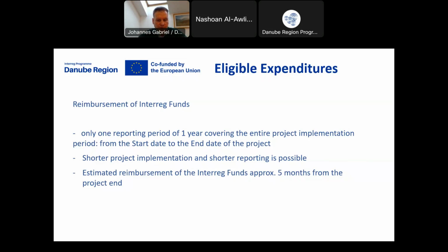If the reporting is incomplete, it can lead to non-reimbursement of the costs, or if it comes in pieces and has to be done during several revision rounds, then that time frame can be even longer. If the reporting is done in a very accurate way, then it can be slightly shorter, but 5 months is more or less the average, according to our experience.